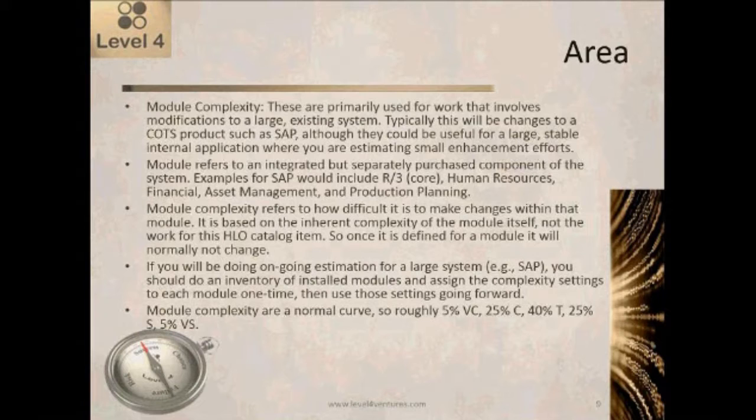So for example, let's take the HR module of SAP. We have to somehow decide, based on experience working with it or some other way, is that particular SAP module average complexity, high complexity, low complexity, et cetera. But then once we've decided that and made a note of that, every estimator and every estimate should set the same complexity for work on anything within the HR module.